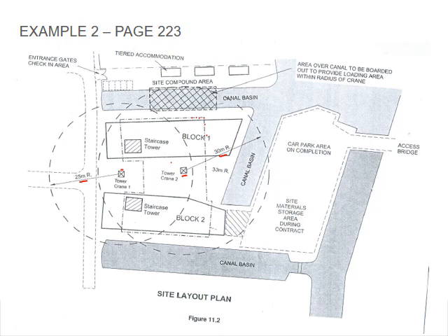So you will have, at one stage, done everything around the crane, and then you need to take down that crane and then fill that section up later on. Once you're out of the ground, you can actually take that one out and only leave the one. So you can read through that.